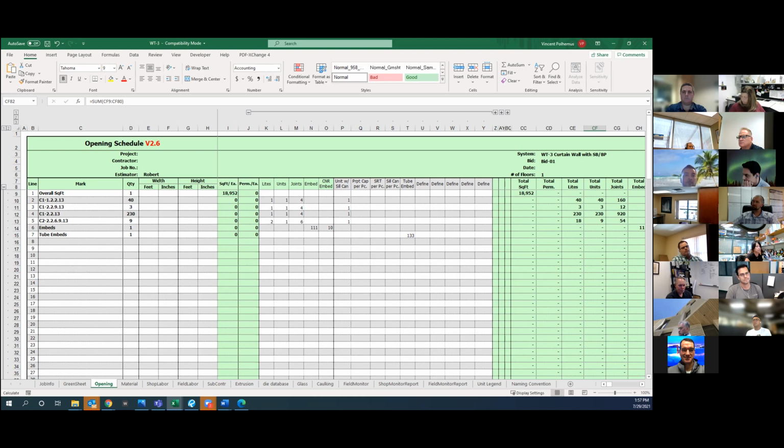It turns out both of them have computer programs where they take those 3 inputs and get a price. So we've simplified our RFQ so that if an estimator is doing their own takeoff on panels, they input those 3 things, and we provide a drawing or a clip from the architectural of the shape, just so they can see it in case there's something weird and they think they can't make it.